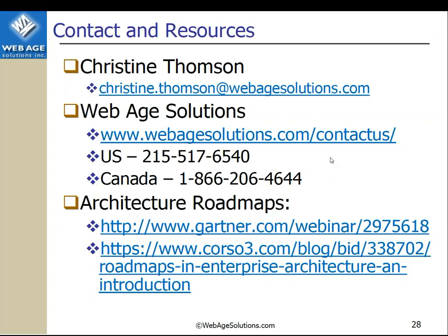Okay, I'm just rereading this. My question was more around sequencing solution options for the roadmap and managing the cost constraints. Oh yeah, okay. So when you're doing that prioritization phase of trying to figure out what's going to come first, this is why, after gap analysis, you will be engaging the appropriate experts to gather some of that information. When you go to that next phase where you're laying the pieces out, this is about what and when, right? You're going to have the appropriate experts at the table, and they should have the information about, okay, if we're going to use this piece, it's going to take this much time, and these are the kinds of resources. So that's very early on, even before we do the stakeholder buy-in, when we're just prioritizing the work.